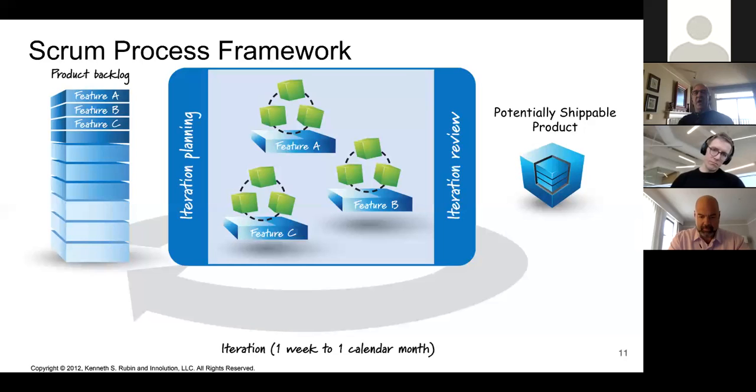But it also is a giant communication mechanism to show whomever what's going on with the product. If you remember from yesterday, the only thing we trust as an indicator of progress is working software. So it's only sensible to demonstrate that working software every iteration, or we won't really know where we are. We have no other way to reliably gauge our progress. So if I'm a stakeholder, coming in to see the things that were created during this sprint is a really important thing. So that becomes one thing.